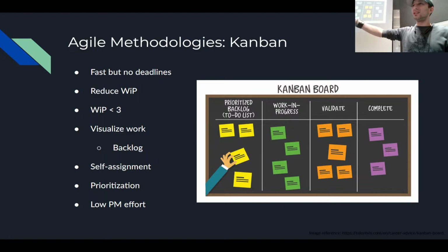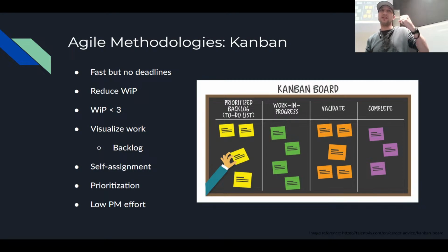Or hey, is this task next because I'm waiting on it, right? This kind of stuff. Additionally, there is the concept of a backlog. Basically, work that needs to get done but is not being done in the near future, you can just put it in the backlog. They also call it an icebox sometimes. And then whenever that work is ready to be done soon, then you put it onto the board in your to-do list. Okay?